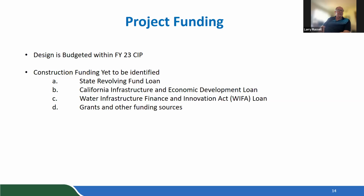Now, I understand the value and the advantage, and I'm willing to support the new tanks, but I don't want to see us write a blank check. If they come in at 35 million, what happens then? I'm not criticizing Kennedy Jenks's estimate, but my experience, being an engineer for 40 years, is that I depend much more on contractors' estimates than engineers' estimates in going forward.